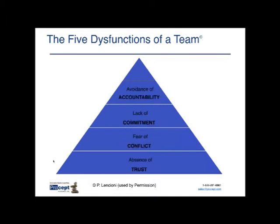The fourth dysfunction is avoidance of accountability, which follows naturally from lack of commitment. You can start to see how these build one on top of the other — it's the natural progression of a dysfunctional team. You may not immediately notice a lack of trust, but when you see that team members are avoiding accountability for delivering on project or team deliverables, you should recognize that there's probably a problem further down: a lack of commitment, a fear of conflict, or most commonly, an absence of trust.